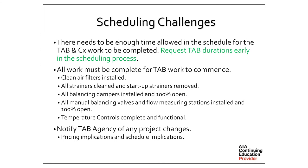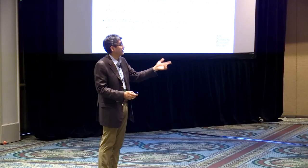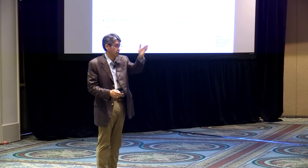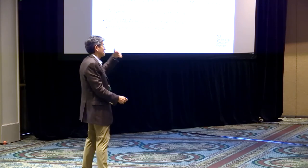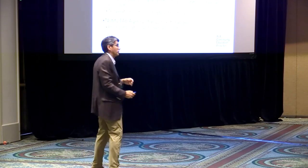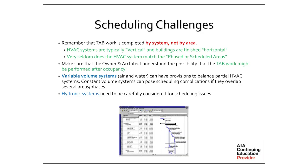Scheduling challenges: as commissioning becomes more prevalent on projects, scheduling is getting much better because the commissioning agent gets involved early and up front, saying 'I need this much time, TAB needs this much time, so when you turn over at X point I need this much time before that turnover.' Getting involved in document reviews early helps a lot to bring up scheduling. The best scenario is getting scheduling going before the general contractor is even hired.